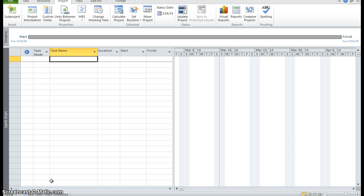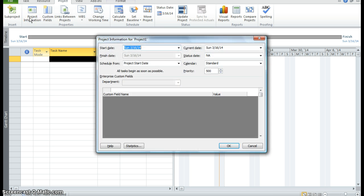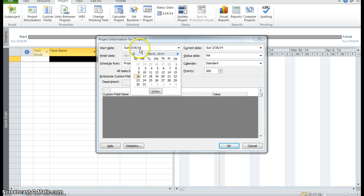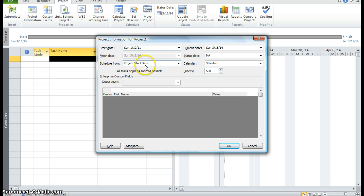Now we want to set a start date for our project. So we want to click on project, the project tab. We're going to go to the project information command in the properties group. And we can see our start date is Sunday, March 16, 2014. We want to change that date. So 1, 10, 2011. And we want our project to start on that particular start date.